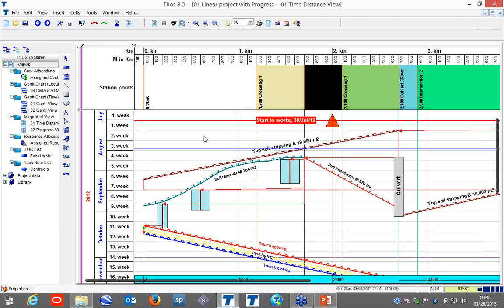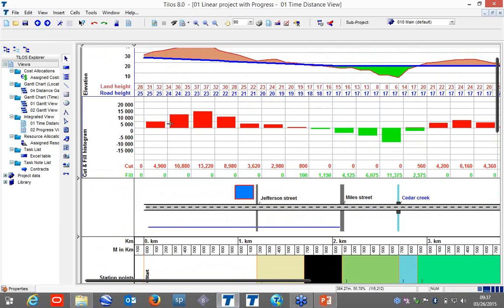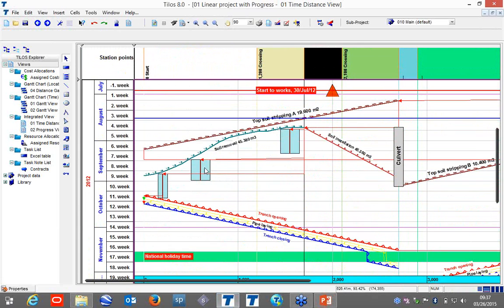During the trainings, actually, we analyze these things, and this project now is a 4-kilometer project with the intersections, with the linear tasks, with the tasks which read the quantity from the site and get the duration calculation. So it is shown as a curve view, and structural works happen at a certain distance, and to be able to display them in a better way, we have rectangle formats.